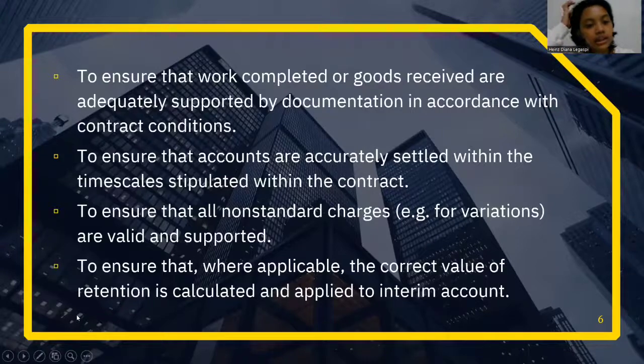Last one is to ensure that where applicable, the correct value of retention is calculated and applied to interim account. So this is to verify that the correct value of retention is allocated and determined in the interim account.